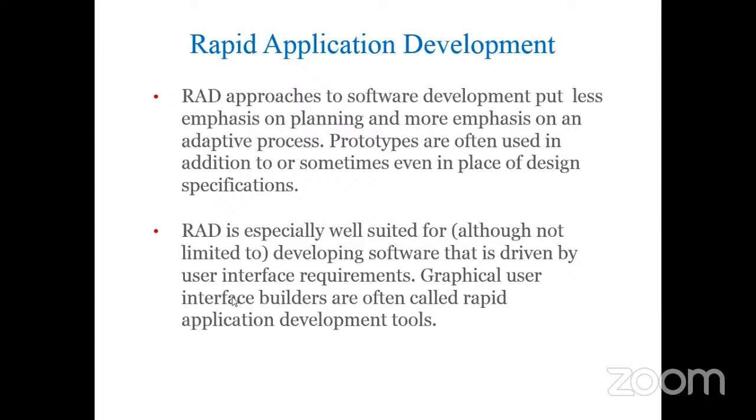In the waterfall model, at some point in time all your requirements would be frozen, then only you will start the design. Now unfortunately the customer has come up with some more requirements, and by that time your design has started, and you say, Mr. Customer, I cannot take your requirements further because I have started my design, and I can only take them after I finish my product after 2 years. Can other competitors wait in the market? They will come up with other products, right?